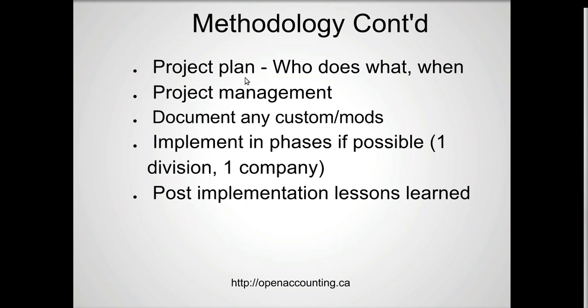We want to make sure we have a good project plan which talks about who's going to do what and by when, and have a schedule. It's important, for example, to time implementation, let's say, during a slower period of the business, and have targets that we're gonna shoot for. It's also important to have some project management, either internal or external, somebody to make sure that the project is staying on track and doesn't go out of scope and go in different directions. And it's really important in terms of making the implementation successful.